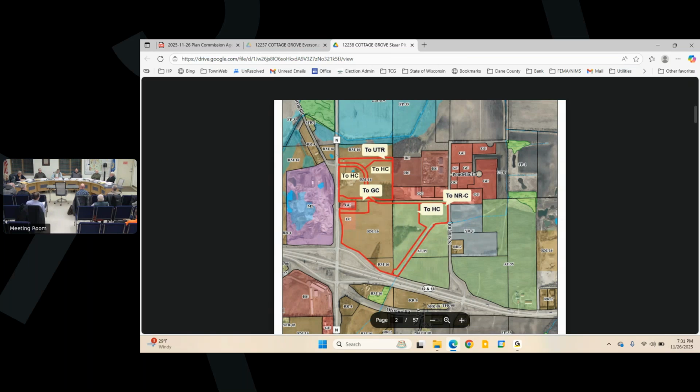You're not obligated to act on it tonight if you don't want to. The town has 90 days from submittal to act on plats. So if you find that this and other issues are too much, you're able to defer it. And if you feel that the final plat will be substantially different from what you're seeing here today, a 1 month deferral may be appropriate. And then the parties can decide to talk to each other or not and revert back to whatever the default arrangement is, which, as I understand it, relates to a 4-acre piece of LC1 zoning to the immediate south of the Paul Davis site. But I'm not party to that agreement.